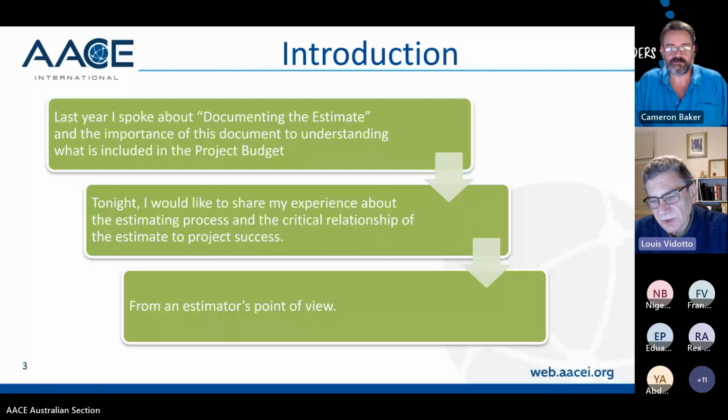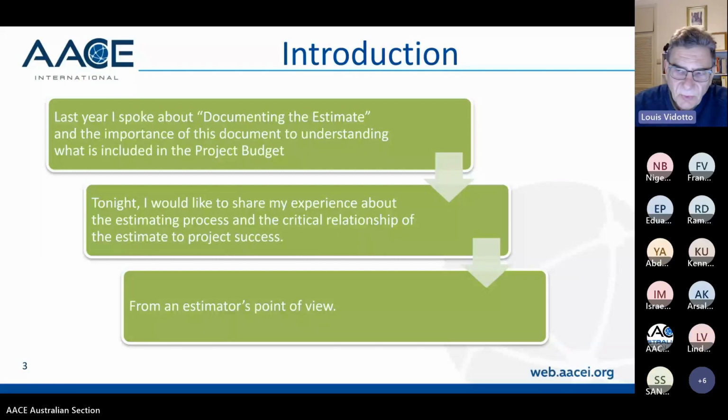We've just come off a project where the estimate was built. It did not reflect the current scope of the project. It did not reflect the current project quantities. And it was a nightmare. We had to kick off a fairly intense change management process, and it was very difficult to follow. The other bit that made it quite difficult was also the basis of the estimate wasn't clear about how the estimate was built, what the assumptions were, and what the strategy that they incorporated was. So it made it very difficult.